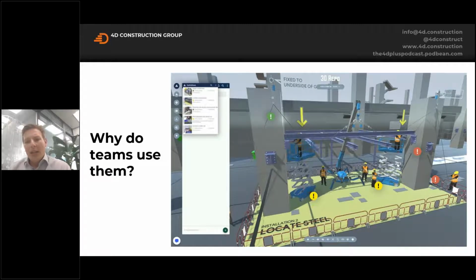And the idea is that in some of the other models, you might see general overviews of master plans, which is great, overall logistics plans, which is brilliant. But we took a real deep dive at 4D and looked at safety on high risk and repetitive tasks. So here we've got steel beams that are being installed. We had to install many of them in a relatively confined space.